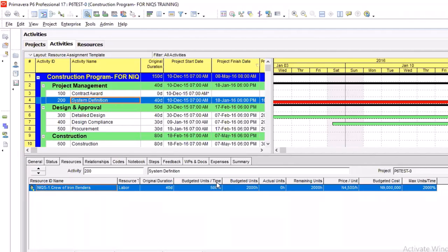And we've put the quantity that we desired. And we said yesterday that once you see 500%, it is five persons. 100% is 1 person, right? 500% is 5 persons.